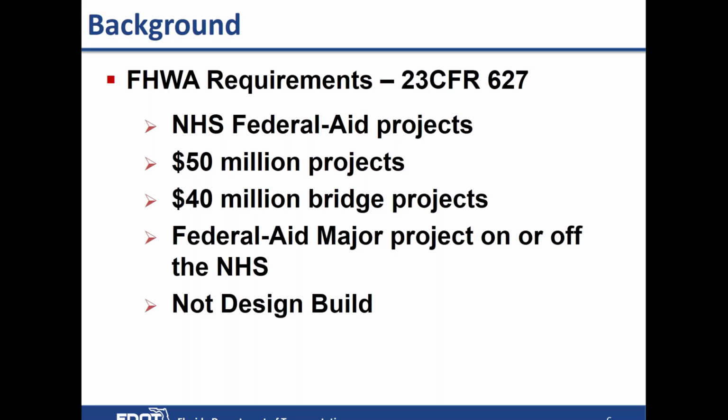And design build projects are not required. Now, many times we don't know if it's going to be design build until right before the letting. So really it's due diligence to perform VE studies on those projects. If you know it's definitely going to be design build, and many major projects are, it's not a required project by the federal regulation.